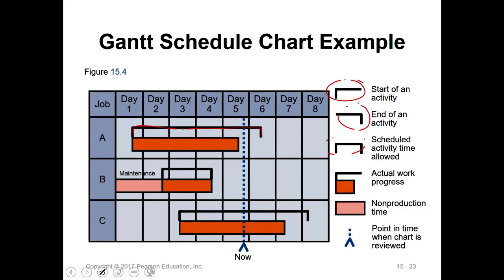And the solid bar is showing, okay, here I'm already finished about 4.5 days. But this dash line means this is the current time right now. And according to the Gantt chart schedule, I should reach the end of the 5 days of the work. And look at this moment, you see,